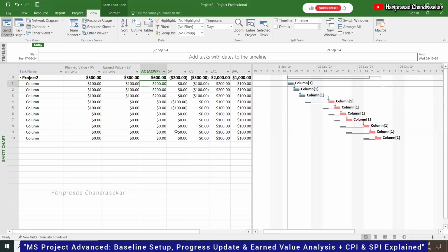That is manually changed by us, right? Yeah, there we manually put, but here, because actual is what we are getting, that manually only we need to put. But in this case, we completed 5 days task. We planned, and three activities we completed. So I told you, post 5 days, what we planned is planned value, 500, what we earned is earned value. Actual cost is what we actually spent. For 5 days, we need to plan for $500. Then, this is just terms, just so that you understand.